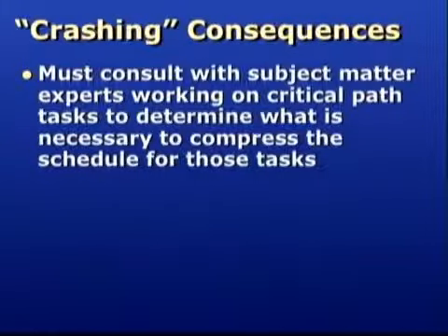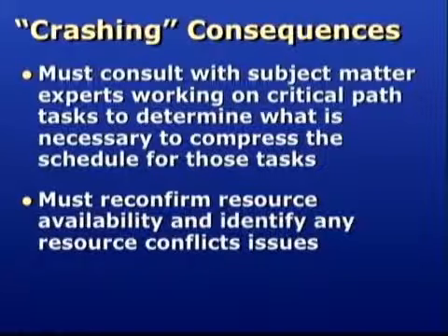When issues occur that affect the timeline, a manager should consult with the subject matter experts and the persons responsible for completing those tasks. They can best determine if adjustments can be made to compress the schedule for those specific tasks and determine the consequences for that action. Also, when a situation occurs that requires compressing the timeline, a manager must re-verify the availability of the affected resources because those changes could have introduced new resource conflicts. Our video production team also had a problem that required them to crash their project timeline.